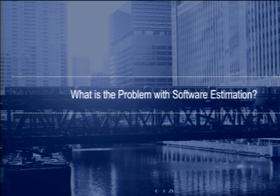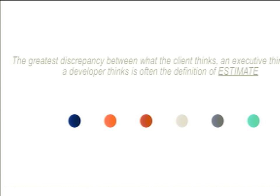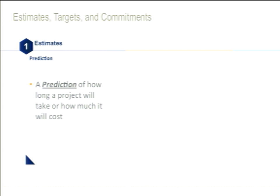What is the problem with software estimation? The first issue is the discrepancy between what different people think 'estimate' means. When a developer, a salesperson, a client, or an executive says 'estimate,' they're probably all talking about different things. Estimates, targets, and commitments are entirely different terms and concepts. An estimate is a prediction of how long something is going to take — not what it's going to cost or what you want it to cost.